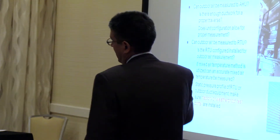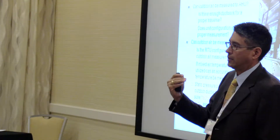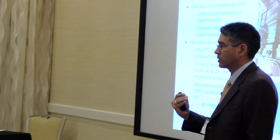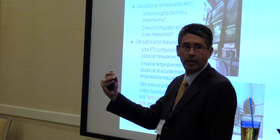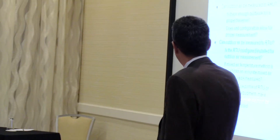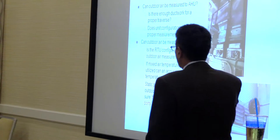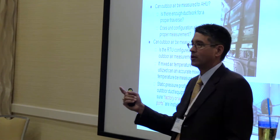That's what we want to look at ahead of time — when reviewing documents early on. How am I going to get outdoor air flow measurements? Are these critical? Let's find a new way to lay out the duct work. Rooftop units become a big challenge. How can you measure outdoor air flow on a rooftop unit?